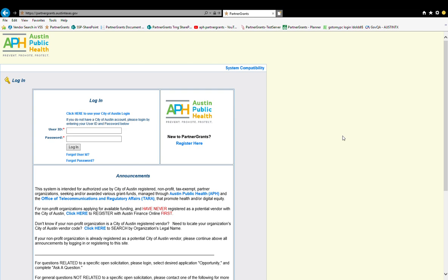Before your organization completes either task in the PartnerGrants system, stop now. You must first ensure any and all eligible remaining outstanding expenditures have been accounted for and a claim submitted within the PartnerGrants system. Failure to do so will cause significant delays and may prevent your agency from receiving any final payment which it would otherwise be entitled to.